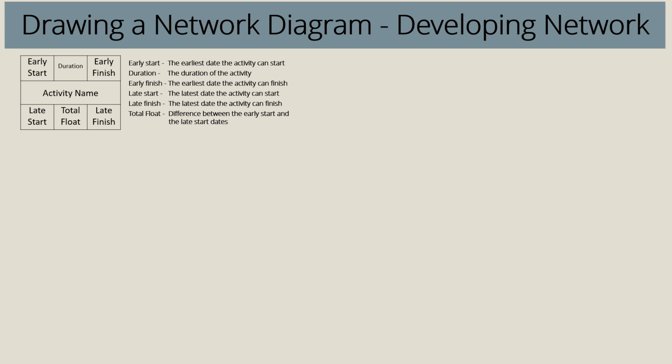The third and fourth steps can be done in parallel. The fifth step is adding details to each relationship, such as the type of dependency: start to start, finish to start, finish to finish, or start to finish. Whether it is required or discretionary, it will be applied at this stage. The final step is identifying and creating an endpoint of the diagram.